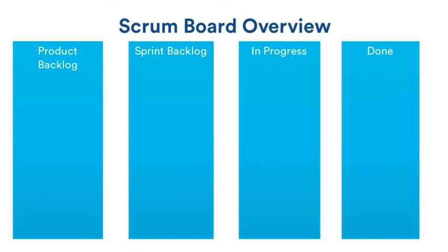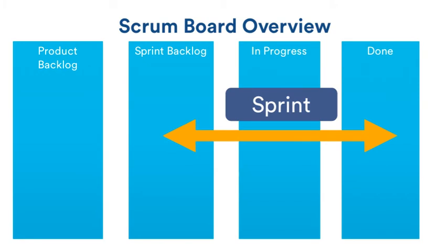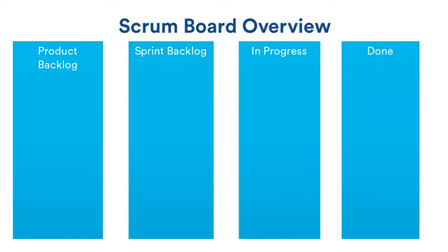Unlike Kanban boards, Scrum boards help teams whose focus is on planning, committing, and delivering bodies of work over a fixed-length period of time called a sprint. In these instances, the team decides how long they want their sprints to be. Typically, sprints last about 2 to 4 weeks. Managing the Scrum board before, during, and after a sprint is a team effort.